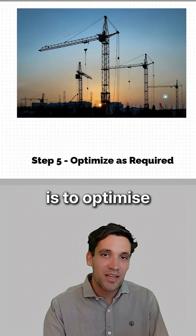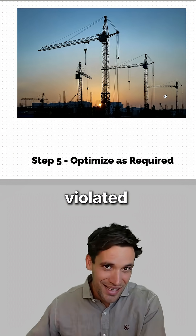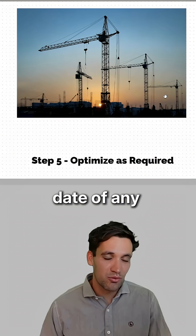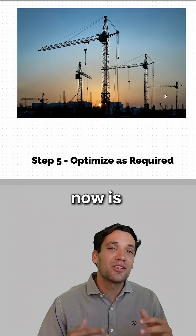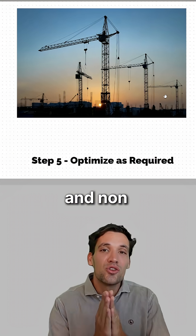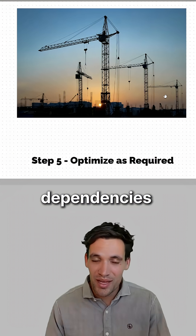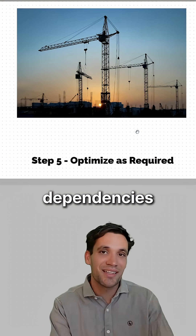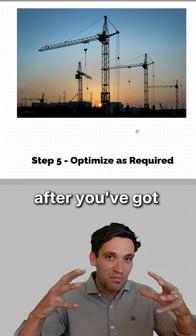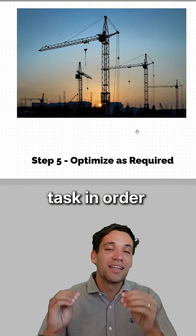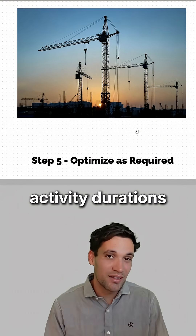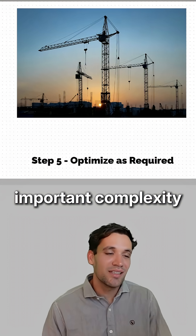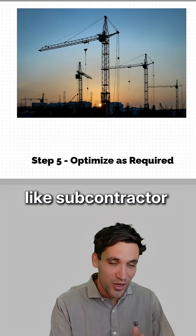The final step is to optimize. If you've violated any constraints — like the finish date of the project or the finish date of any separable portions — now is when you can play with resourcing and non-mandatory dependencies to save money. But always add optional dependencies after you've got the big picture correct: tasks in order and reasonable activity durations.